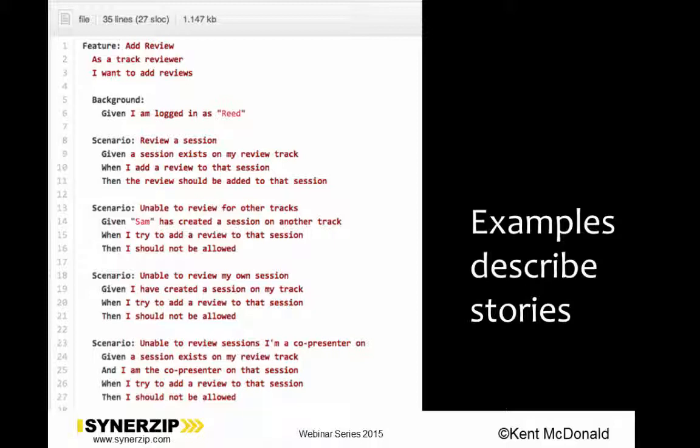There's a technique called the Three Amigos, and I'll talk a little more about it later, where you get people from the business, from the tech, from a development, and from a testing perspective, all looking at stories together and saying, have we got all the examples fleshed out? So what you usually see is that maybe about 80% of the time it's product owner and analyst type folks working on these things, but they're bringing in developers and testers, and so they're spending about 20%. I'll show this a little more coming up, but great question. Certainly someone's working ahead a little bit to get those things identified, but you want members from the different perspectives looking at it to make sure we get it fully fleshed out.